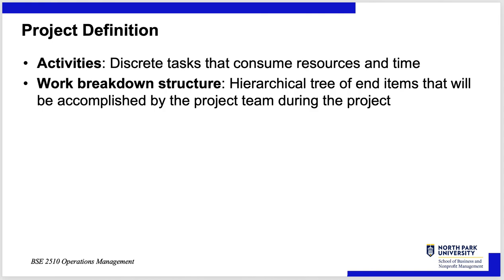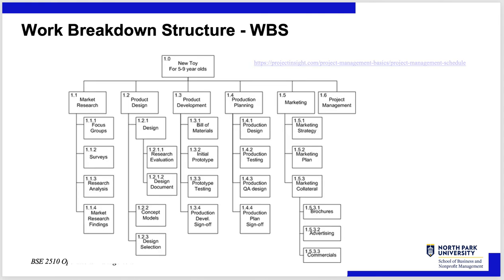In project definition, activities are discrete tasks — individual tasks that consume human resources, capital resources, money, and time. You want to have a work breakdown structure (WBS): a hierarchical tree of end items that will be accomplished, organized almost like an outline.